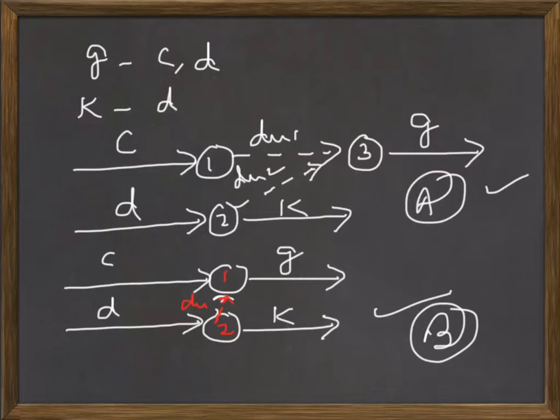and that indicates that for any given project you can have various types of network diagram. Look and feel wise they can look different, but as long as you maintain the immediate predecessor relationship, they will be correct. In this kind of situation, where an activity is immediate predecessor of more than one activity in different combinations, it becomes necessary to use dummy activity. Here you are seeing that activity D is immediate predecessor of K alone, and in combination with C it is immediate predecessor of G. So it becomes necessary to use dummy activity here.